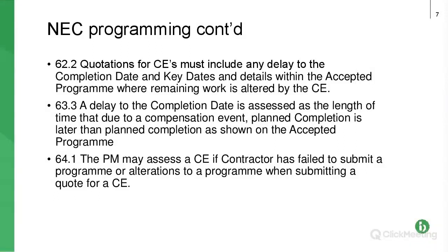63.3 deals with how the delay is calculated for the compensation event, so how your extension of time is going to be calculated, and it's pretty simple. It's the extra time that the delay has caused.